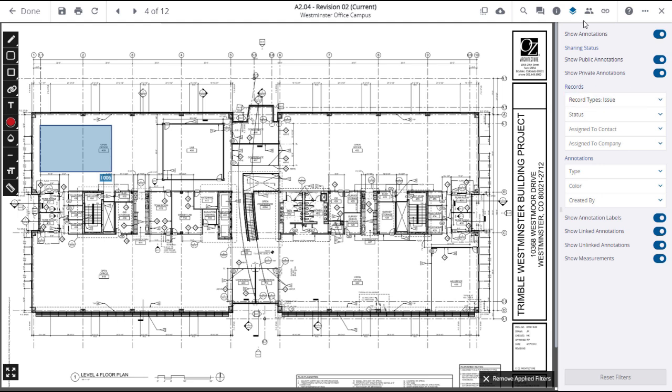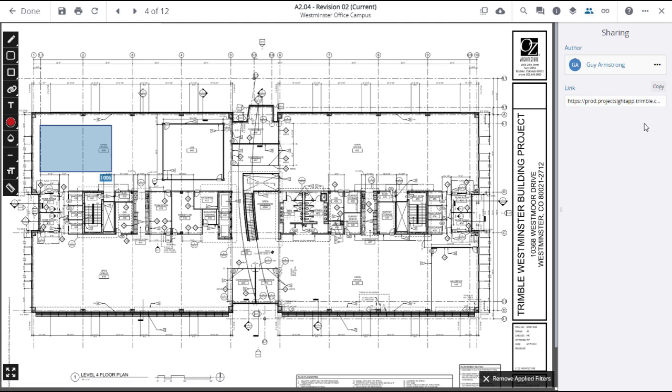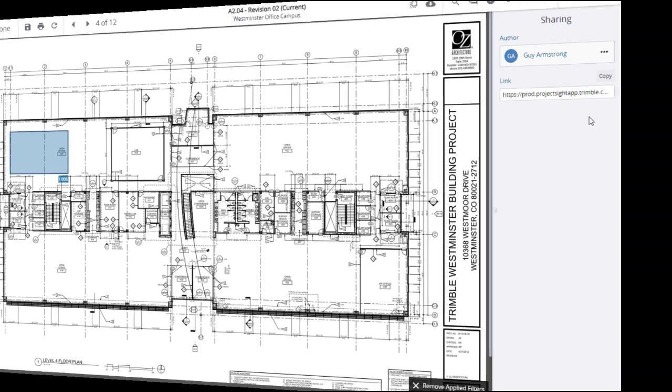Click on the Share icon which will open a side panel showing the author of the drawing and a URL link to that specific drawing. Click on the Copy button to copy the link and paste it into emails or other communication regarding the drawing. Note that only active project site users with access to the project can utilize this shared link.